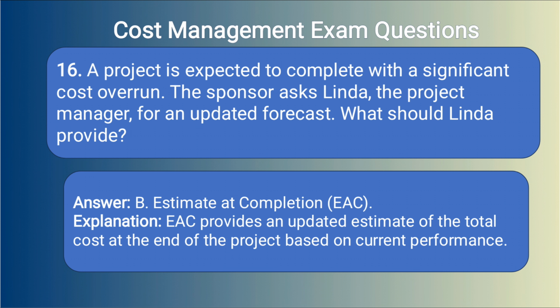Answer: B. Estimate at completion, EAC. Explanation: EAC provides an updated estimate of the total cost at the end of the project based on current performance.